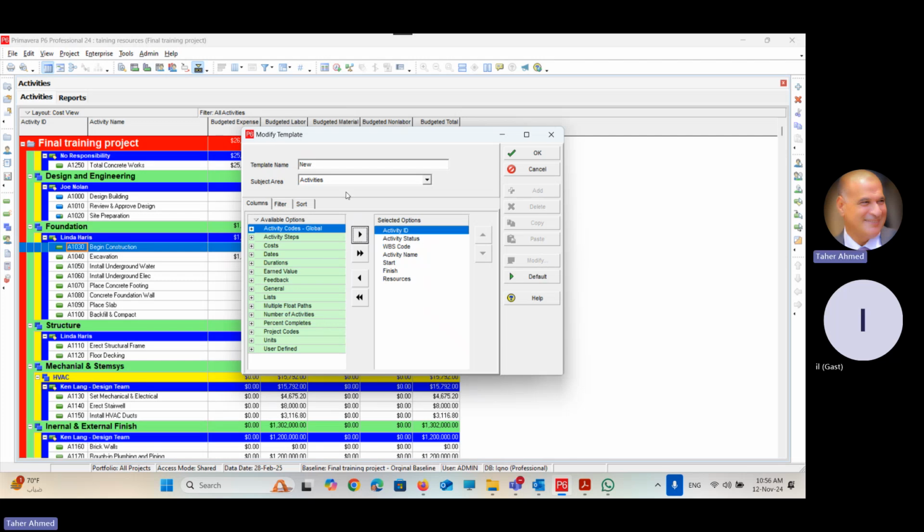First of all, make a name for the template. And the name, I have to think about it: why am I exporting the information? There are 3 reasons you export the information to Excel. The first one is to use it as an update tool. Send the Excel sheet to the proper team member, selecting the information which he can use in the update. This is the first reason.